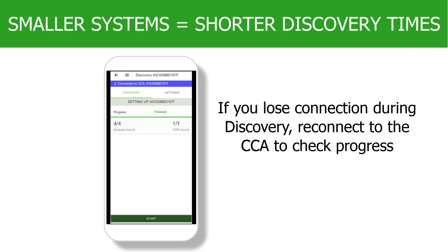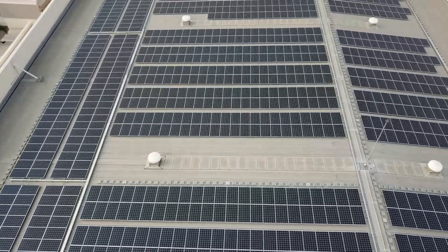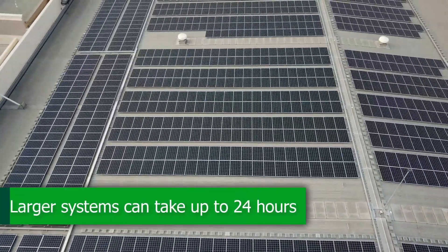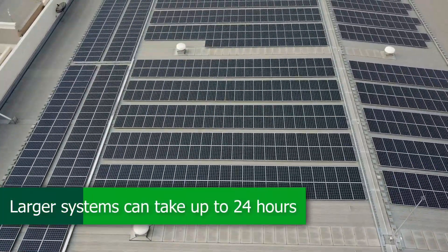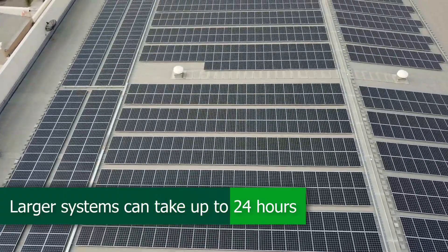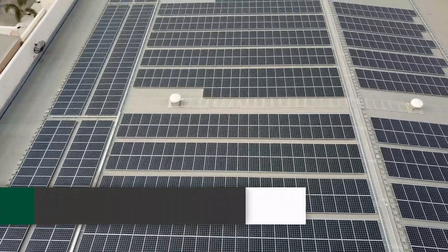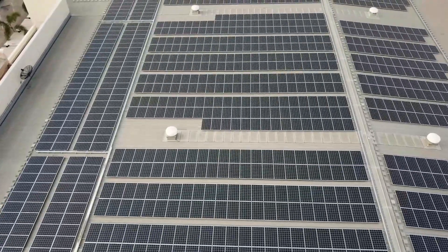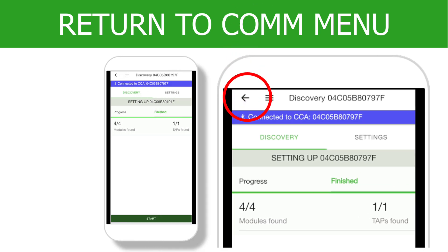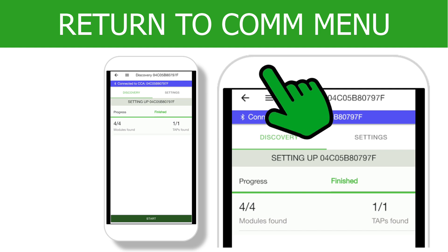Depending on network quality, it may only take 5 or 10 minutes for a system with 20 to 30 TS4s. For larger systems with hundreds or even thousands of TS4s, Discovery could take up to 24 hours. As Discovery runs in the background, tap the back arrow on the top left corner of the screen to return to the commissioning menu. Notice Configure Communication now has a green check mark.